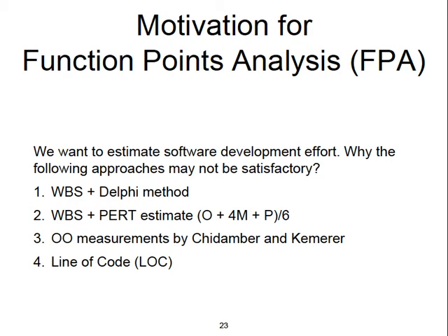Once it's small enough, it's easy for us to understand, and then we can estimate it. And the Delphi method is that we may have a few experts working together and then they try to independently give an estimate. Maybe for this task, some estimate 2 days, some estimate 3 days, and so on. And usually that's not too bad.